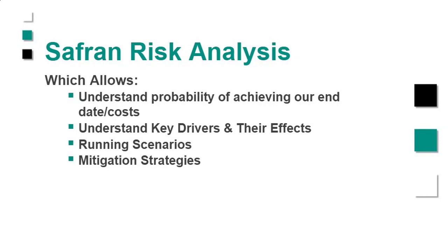It also lets us run scenarios. So when we do our mitigation strategies, we can say, okay, what if we can get rid of this risk? What if we can mitigate that risk? What does the model look like now? Which helps us really understand if we're going to spend a bit of money to save some time, is it worth it in the end?